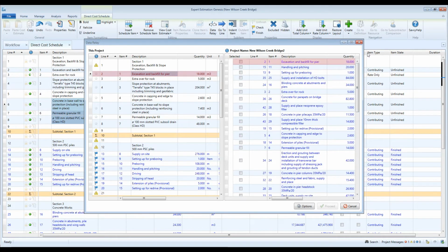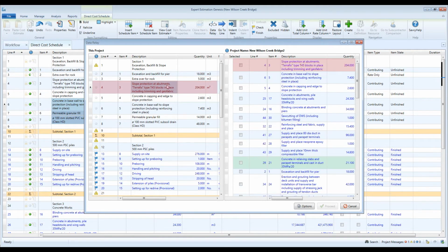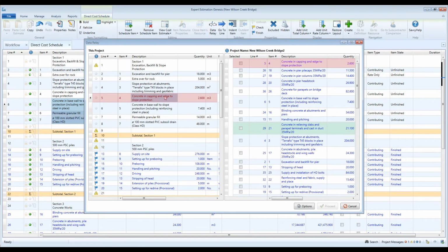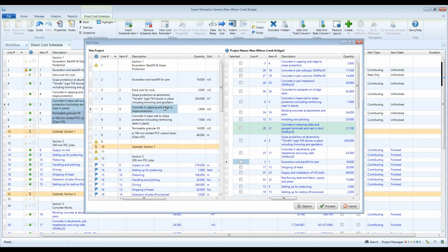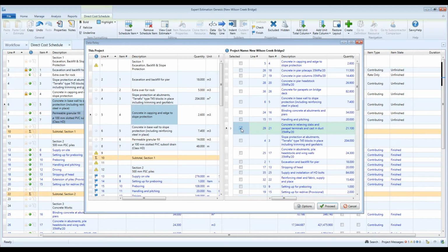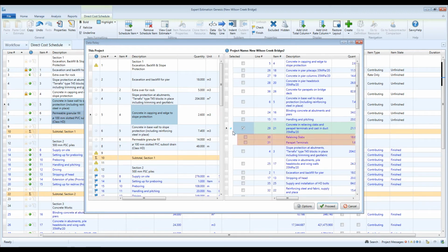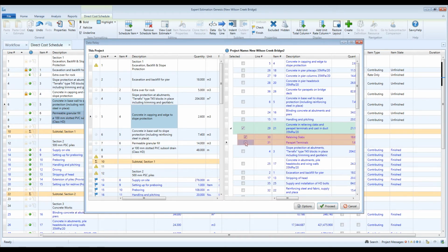In this example, these two projects are going to have matching items. So for anything that we click in here, there will be a corresponding item for each one. The Data Relay will import everything that can be used in a cost schedule, or anything that will be brought in during a normal copy and paste operation. You'll get the item cost estimate, potentially child items if you select them, global defines, and all the resources that you used.